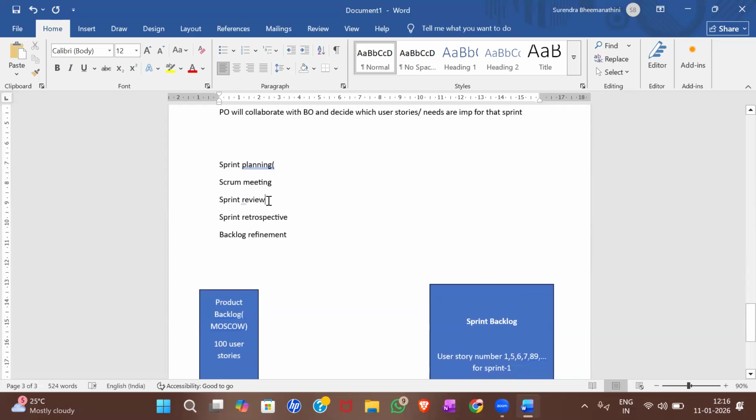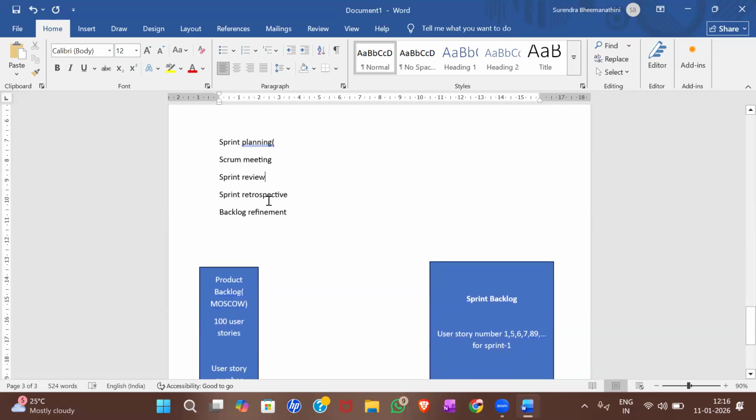Sprint review is just what the name suggests. After the sprint is completed, you will have a shippable product. You take that working software to a stakeholder, who reviews it and gives feedback. With that feedback, if it is a bug or change request, you again assign business value, story points and acceptance criteria to it. Based on urgency, you decide whether to move it to the next upcoming sprint or wait for later sprints.